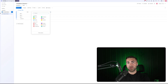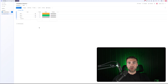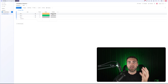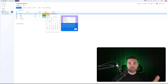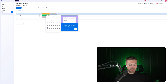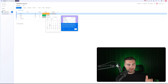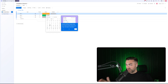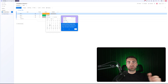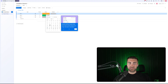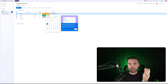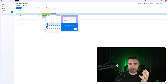First, we want to go ahead and add a new timeline column. Press the plus button on the far right-hand side and search for the timeline column. You can click into it and select some dates. The difference between a timeline column and a date column is that the timeline column allows you to select a start date and an end date, so it spans over a period of time, whereas the date column is just one day.